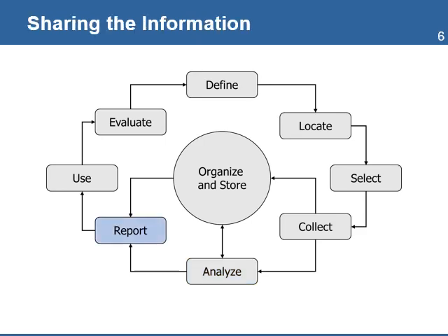Making the results of the analysis available to stakeholders is the next step. Reporting requires an understanding of the stakeholders' requirements to receive the information. This includes the format, the medium, content, and frequency. You need to remember that it is important to collect the right information, and it's also important to share the information with the right people at the right time.